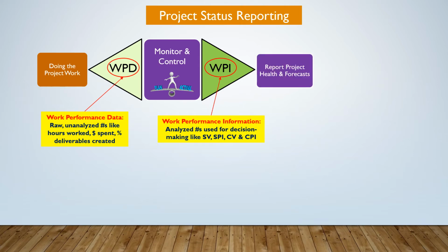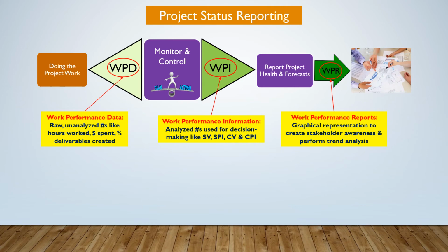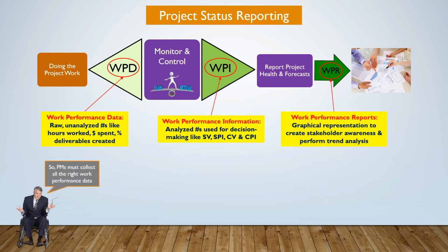All that WPI taken together allows us to report project health and forecasts to stakeholders. And we do that in the form of work performance reports, which are graphical representations to create stakeholder awareness and perform trend analysis. So to begin with, the project manager must collect all the right work performance data.